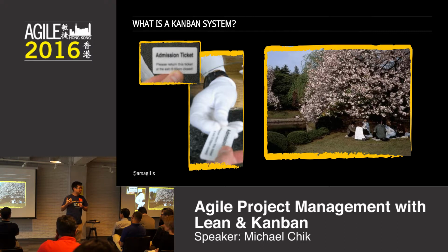Has anyone here ever used a Kanban board? A lot of people running Scrum actually use Kanban boards. So in some Kanban boards, you limit the number of work that can go into a specific column. That is your capacity, or the number signifies your capacity. When it's full, you don't let more work in. This is designed to relieve you from what we call the waste of overburdening.